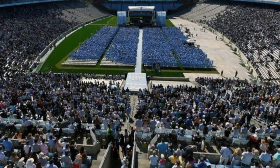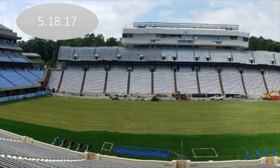And if you've ever done that, which I've never done, you stop your sewer from coming in, you pump it with portable lines to the outfall, and you replace it. So it's a live, monitored system throughout that process. It's a big deal, and the hospital obviously can't be shut down. So it was quite a joy to add this to your project. But field turf's already in on the left side.